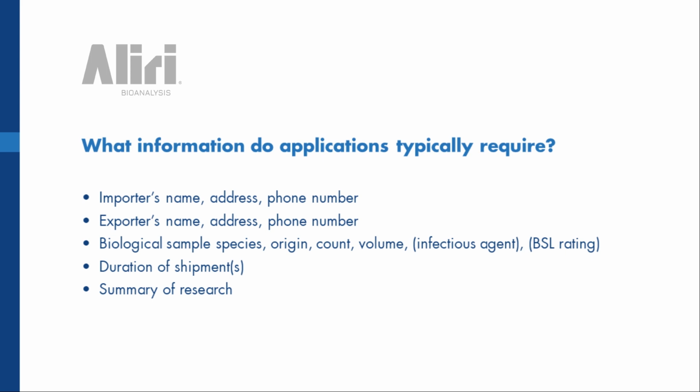They sometimes want to know a summary of research, especially the CDC. So if we're importing knowingly infected materials into the US, the CDC is going to ask, what are you doing with these materials? What is the purpose of the research? And this is something we typically can just copy and paste out of the introduction paragraph for protocols, and then we edit as we need to maintain confidentiality. So that's important to note. The CDC does care about why we're importing these samples.